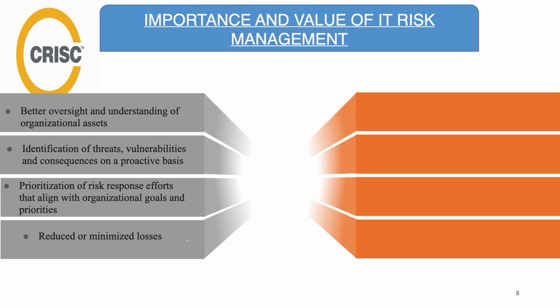Risk transfer enables the organization to mitigate the consequences of the risk by transferring or sharing it with a third party. Cloud vendors, for example, reduce the business risk of business interruption for their clients by providing off-site data backups. And lastly, we can minimize the losses by using risk acceptance. Eradicating or transferring every risk is practically impossible. So as an organization, we must accept the specific threat as part of its overall security risk management process.